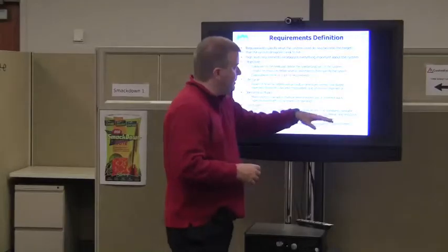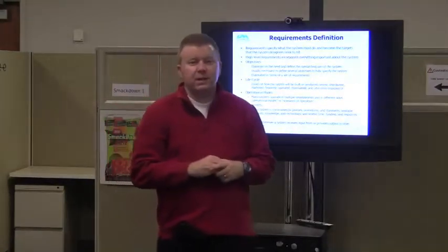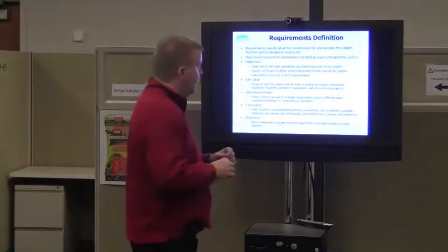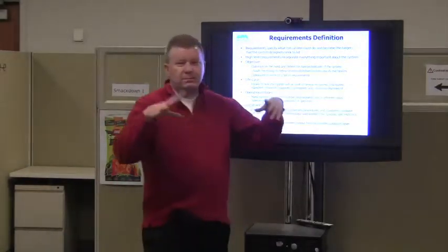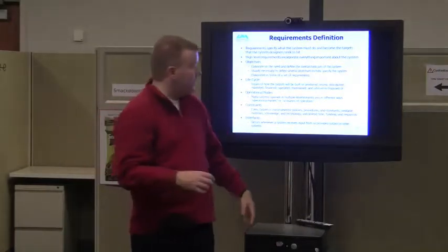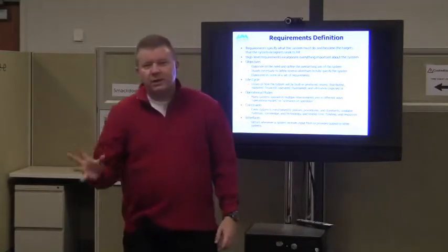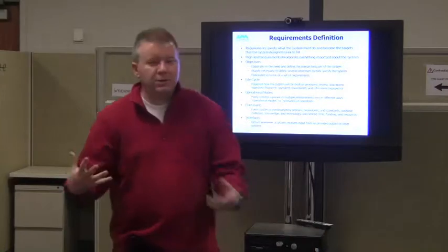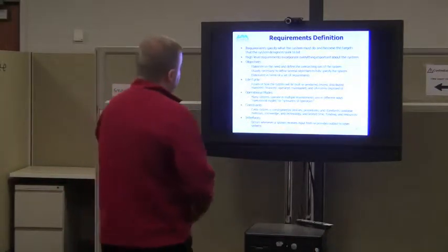And then there's also limited time, funding, and resources. Those are always put in as requirements, right? The mission shall cost no more than X billion dollars. It must be done by this date. And then there are resources. You can have no more than this many people, and you can do all this, right? All that comes to pass.